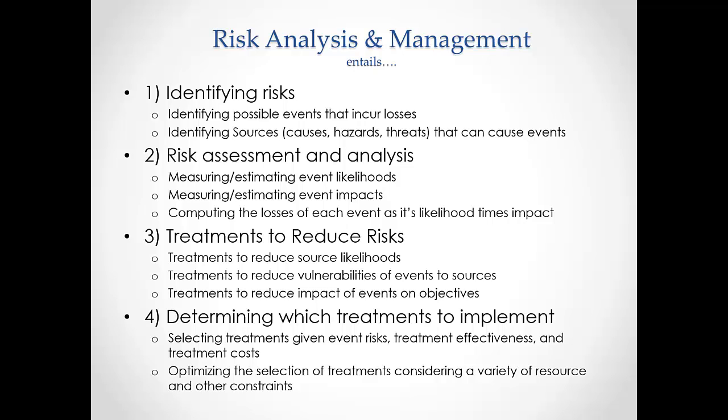Second, risk assessment and analysis entails deriving ratio scale measures of likelihood and impact, computing risk as a product of the two. Third, identifying ways to reduce risks with treatments to reduce source likelihoods, treatments to reduce vulnerabilities of events to sources, and treatments to reduce the impact of events on objectives. And fourth, deciding which treatments to implement, possibly with an optimization model.